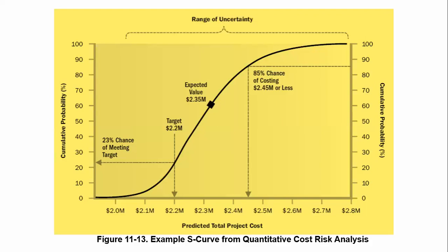And if we read what the PMP guide says in chapter 6, where it was referenced, you can see it shows a probability distribution for a project with a probability of achieving a certain date, that is, a project finish date. In this example, there's a 10% probability that the project will finish on or before May 13th. It says, while there's a 90% probability of completing the project by May 28th.